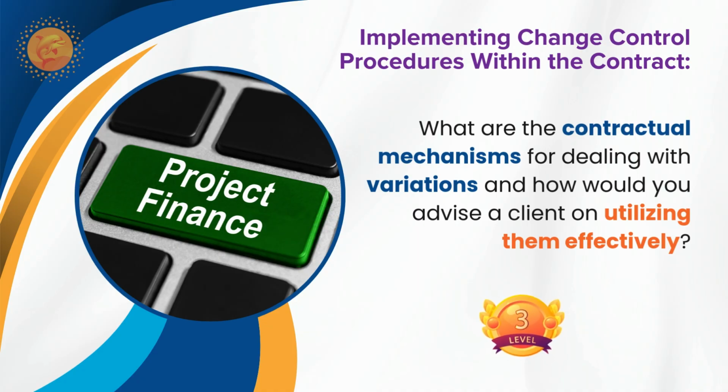Okay, thank you. Other than that, you should have a requirement for notification, even if it is unknowingly instructed or is coming out of project requirements. Whenever the contractor comes to know or becomes aware of it, within how many days he has to give notice, and timely submitting the proposals, approvals, maintaining the budget control, all these things are part of this. So we have to make sure these are incorporated within the contractual mechanism. That is the requirement.